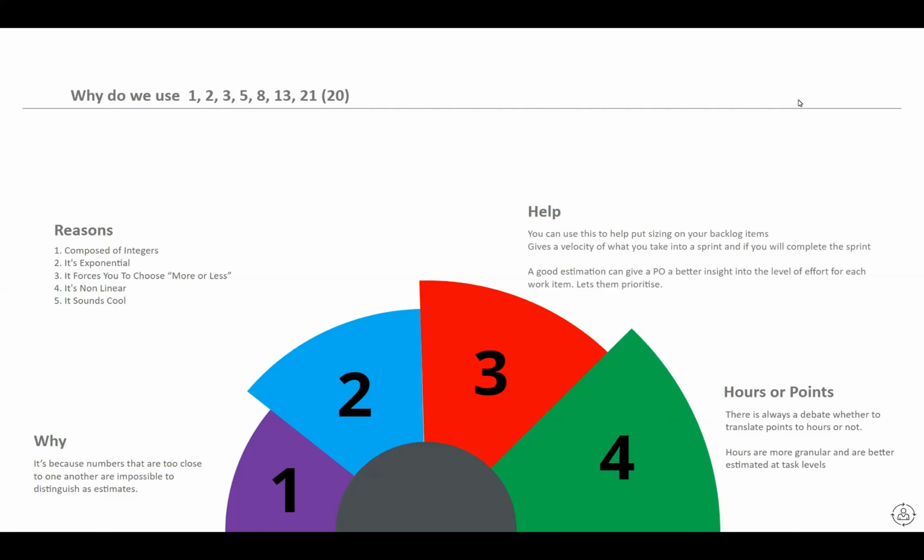And you don't need to constantly keep re-estimating when you've got your story points. Once you've got those points, you've got them. Whereas with hours, a senior developer could come in and say, I think it's only going to take me 2 hours, and a junior developer would say, I think it's going to take me X amount. Because you did the exercise with the team, it was a team's effort, so it doesn't matter who picks up that task, that work still gets translated.